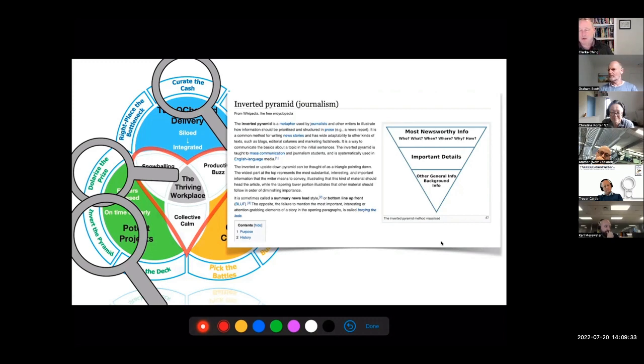And I asked the sponsor of the project, how's this thing going to make money? What would it cost if it was delayed by a month? And he goes, we reckon it's going to make £20 million a year. And if it was delayed a month, I suppose about £1.5 million. And I go, does anyone else know that in the project? And he goes, nope, just me. And it was the starting point of this book. I've had other ones.